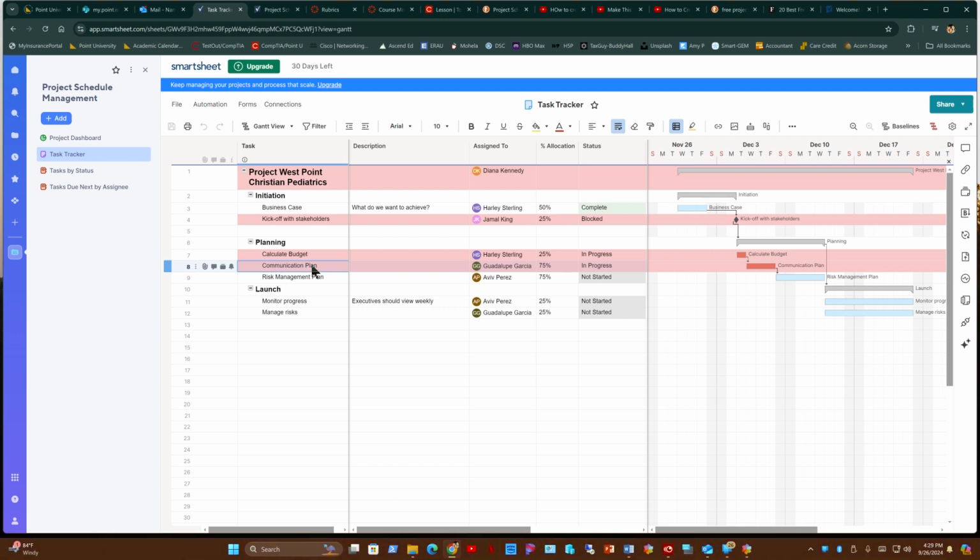project tasks. You'll have to use your work breakdown structure as the high level, and then you'll add to those high level activities and create more detailed tasks in the project schedule.